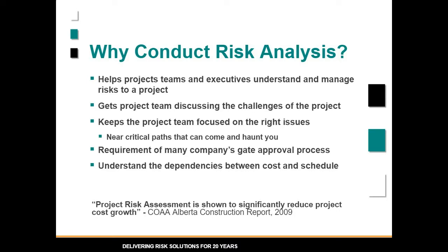So as project managers, we typically do such a good job of managing critical path that it's no longer the critical path and something else becomes the critical path. And it's a big surprise to everybody. So risk analysis will really help us understand what are the things that are likely to become critical on the project, both on cost and schedule.